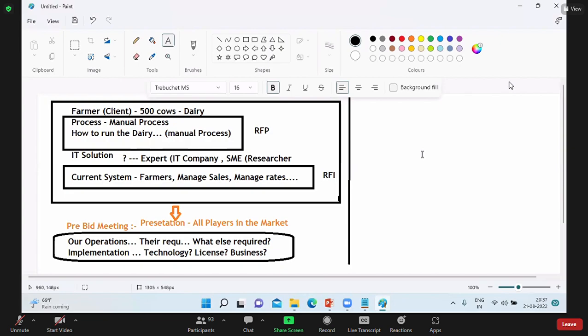The license is about using a technology. For example, you may be working on Oracle as a backend. Who is going to bear that? If I want to implement it, and the client says all that part is mine only, then the costing will be different for me. If I say those are your headaches, my costing will be different, right? Otherwise I'm going to include that costing in the project implementation. If they say that as an IT company, take care of that, then I will include that costing also in the project.